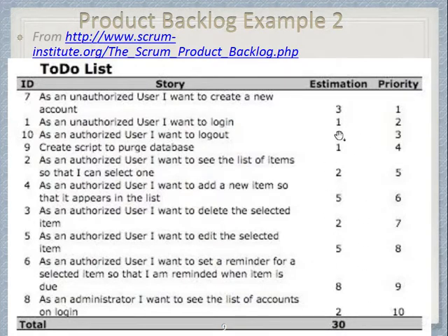in terms of the unit, which is really up to you. Sometimes people use person day for this. And priority means which one is more important from the user's perspective. You can see here, the requirements are all written as user stories. By user stories, you can see unauthorized user, authorized user, and administrator. There are three types of users. So they are not written as the developer. Like you do not see a user story saying that the developer wants to set up the database.